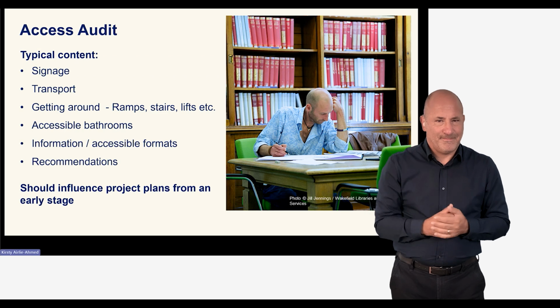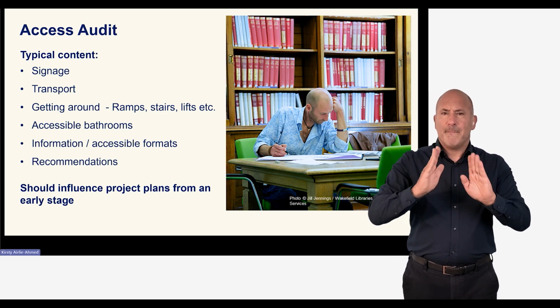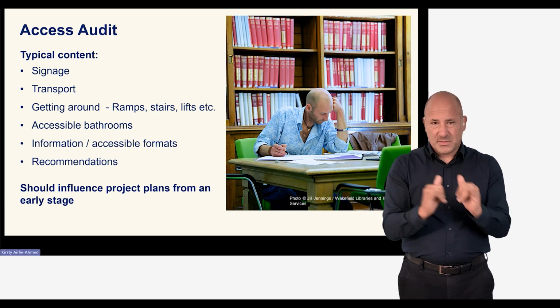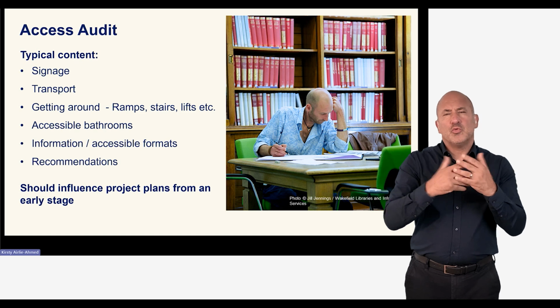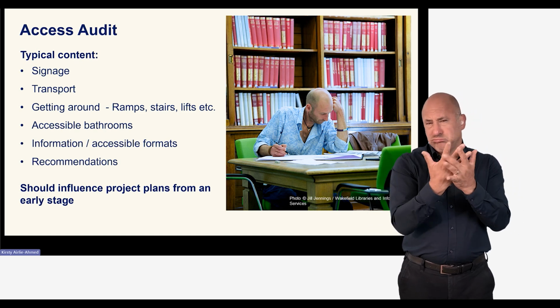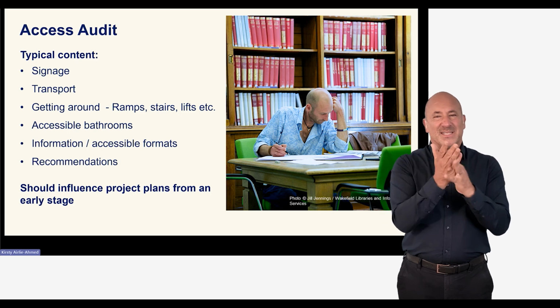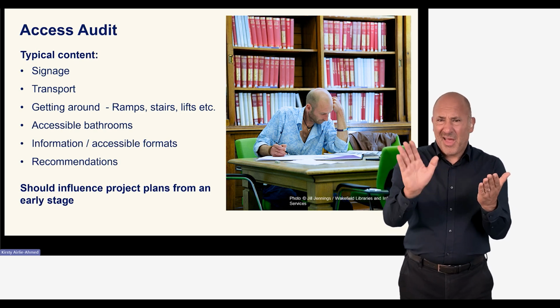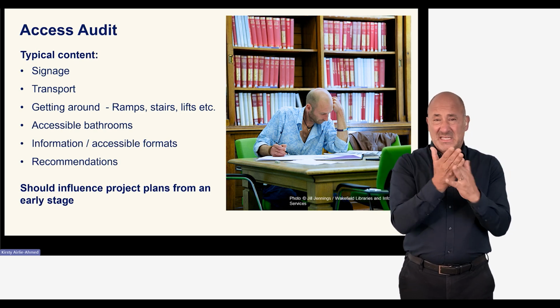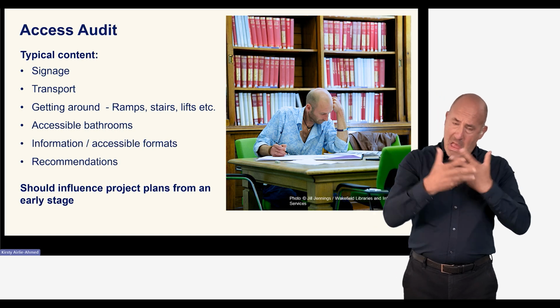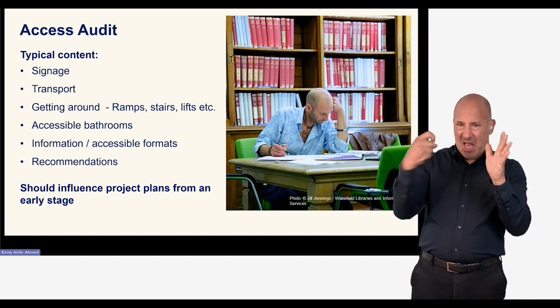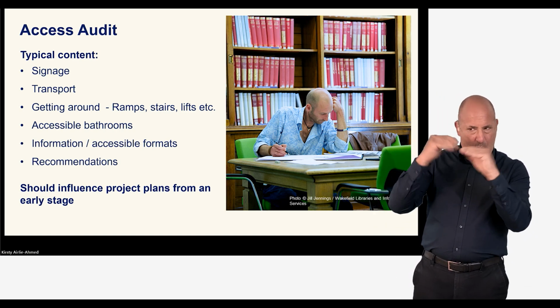For building projects, the next mandatory attachment required is the access audit. One of the biggest problems we see across applications from many different programmes is that documents submitted as access audits aren't actually access audits. They're access statements, which outline alignment with the Equality Act minimum requirements.